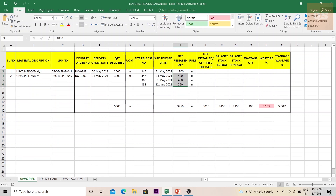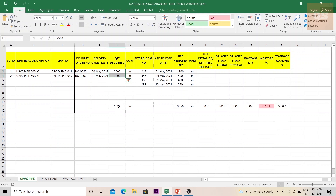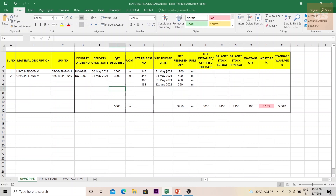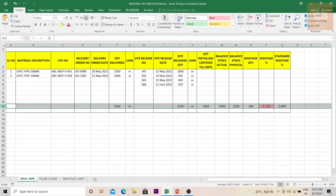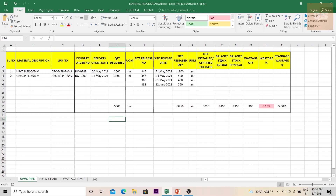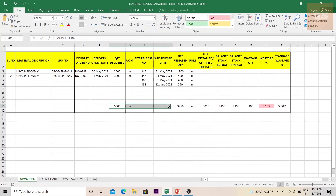Try to group all your pipe sizes of one size together. There will be different LPOs coming for that particular pipe, so you can see two LPOs and two deliveries being made. The total deliveries can be noted down and the total material released to site can also be noted. Since site releases are mixed across lots, you always need to maintain cumulative numbers — the cumulative of orders delivered and the cumulative of materials released to site — so you have a total as of any given date.